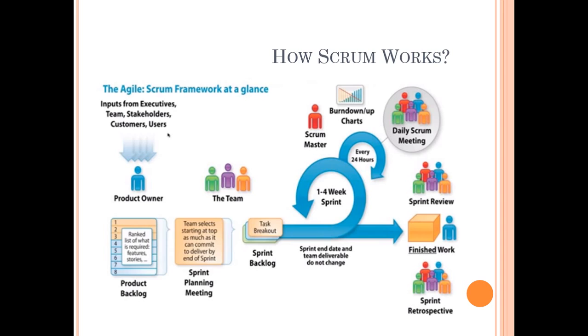If we consider we have a 2 week sprint, then on the first day of every sprint, it is mandatory for us to plan what we would be doing for the next 2 weeks, like 10 days, 5 days a week. So what we would be developing, what requirements we'll be working on for the next 10